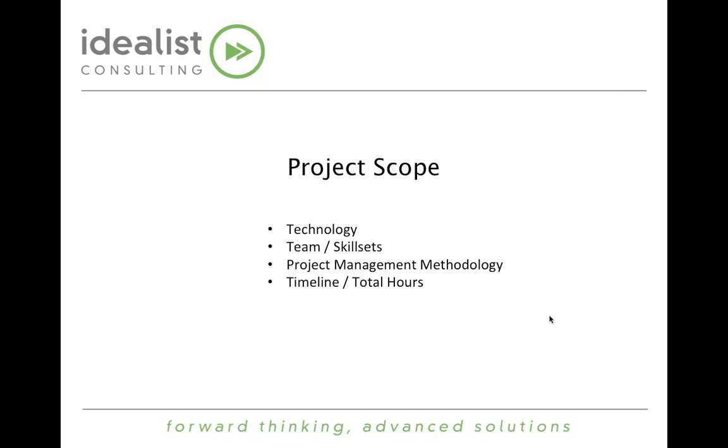As far as project methodology, we employed an agile project management methodology on this project, as we do on most of our projects. It was particularly well suited for this deployment, particularly because we were working with a short project timeline, and also because we were working with Salesforce1, which is a really emerging and developing technology. So Agile was a great choice from both of those perspectives, and it allowed for rapid iterations and expedited development. And we were able to meet the required client and funder launch schedule on this project.